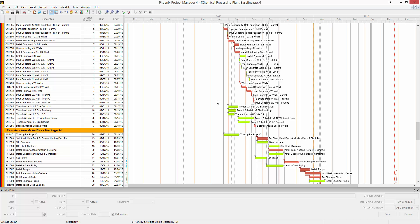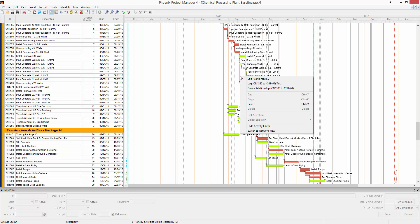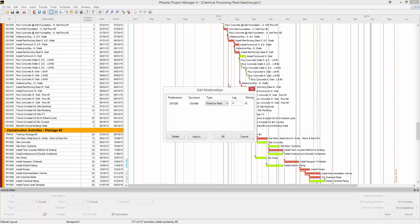Once you have your schedule put together, there are a couple of different ways to view relationships. One is by simply right-clicking a relationship. You can see in the menu that appears there are options for edit relationship, lag to, or delete relationship. If I click on edit relationship, this window will appear. It shows the predecessor and successor ID numbers, allows me to change the type of relationship, and has a place to edit lag. There's also a lag to button, which I'll show you in a second.